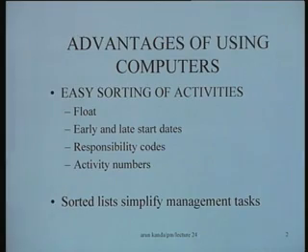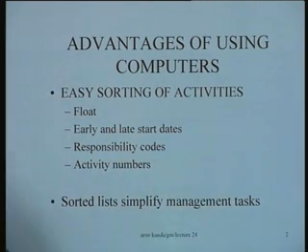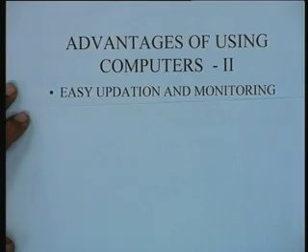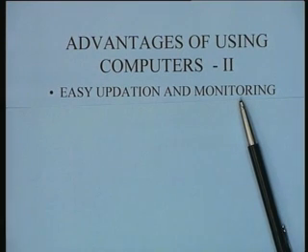So sorting of activities by float or early late starts or responsibility codes or the activity numbers could be very useful to management. Apart from this, another very important use of computers is that they permit easy updation and monitoring, and I think this is perhaps the greatest use of the computer in practical project management.